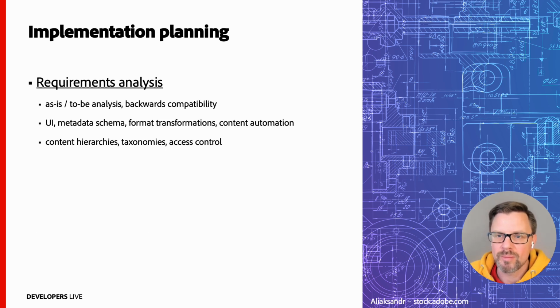Requirement analysis for a migration is a bit more complex compared to a greenfield project when you start from scratch. Requirements can be a bit more fuzzy, like "same features as the old system," or "all formats need to be supported." Or, "there are a couple of downstream systems attached to that legacy system, so AEM is expected to be fully backwards compatible." Such requirements are a good start for a failed project. That is why it is super important to be diligent here.